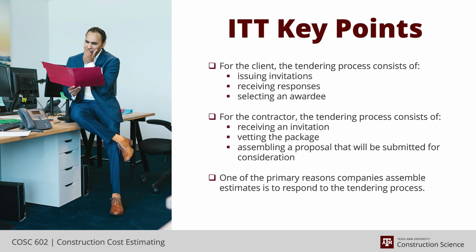That's a very simplistic statement because it takes them a while to get that package put together, and the volume or the complexity of that package also depends upon what FEL stage they're in. So if it's an FEL 1 and they're reaching out for the first time, it's going to be very high level, very conceptual, and they're really looking to bring in some engineers and other support people to help them get the process started as they move into FEL 2 and FEL 3 stages.